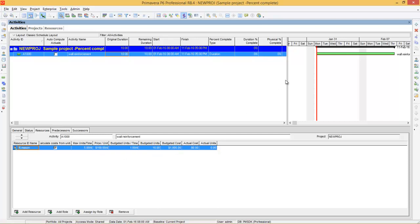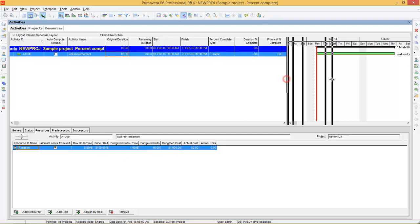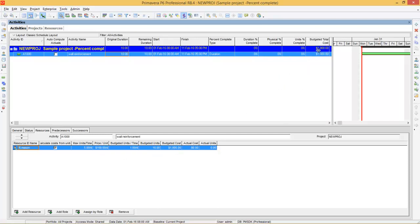That is budgeted units multiplied by price per unit, which makes $1000. That is our project budgeted total cost — you can see the budgeted total cost here. You can also add these columns: duration percent complete, physical percent complete, and unit percent complete.